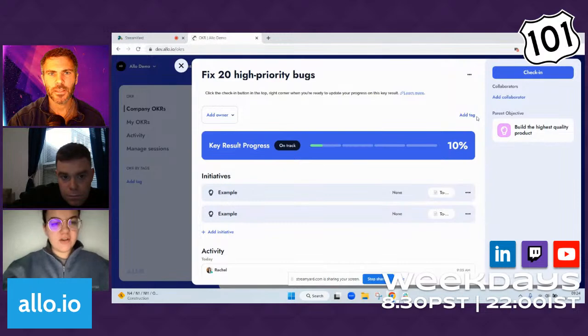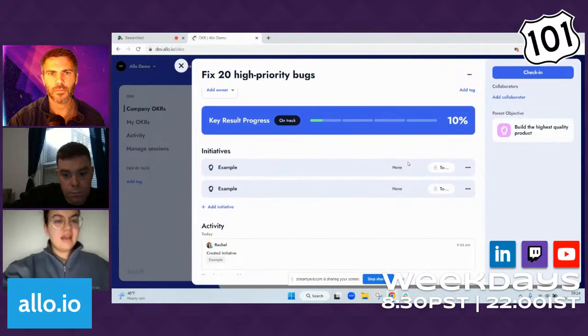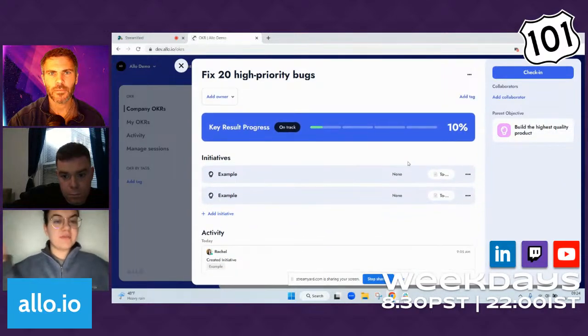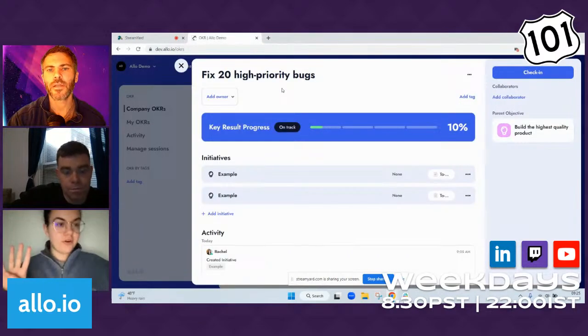In the initiatives, we have every feature, for example, fix bugs on the activity tab, fix whatever on the projects tab, and then each part of the engineering team is assigned to those. If we have 4 activity tabs and you want to put it in percentage, you can put 25% once one is done, or if not, in numbers. If there are 4 features to fix, we would put it out of 4.